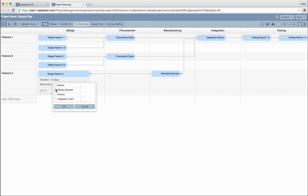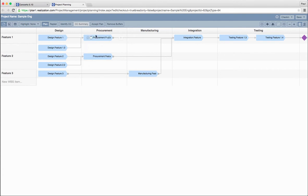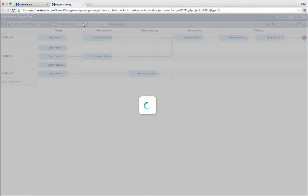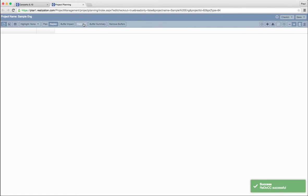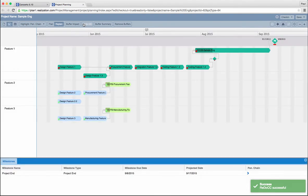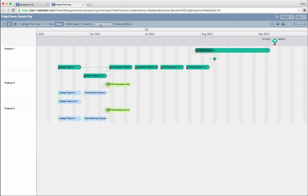We also need to ensure that we have added resources. Now, just press redo CC. If we are satisfied with the impact on buffers and longest chain complete, all we need to do is check the project back in execution.